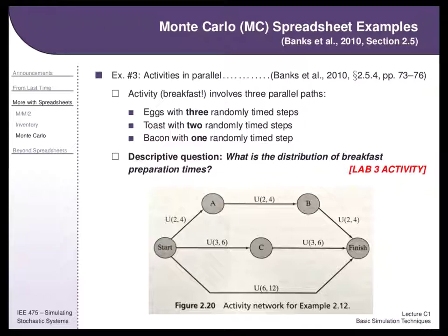That's right. At every individual activity, it's a random number between 2 and 4, 2 and 4, 2 and 4. We know on average it's 3, 3, and 3. So this top one on average is 9. This middle one on average adds up to 9. And this bottom one on average adds up to 9. And yet when we have to wait for all three of them to complete before we can say the whole activity is complete, I'm saying the average of the total activity is going to be greater than 9.